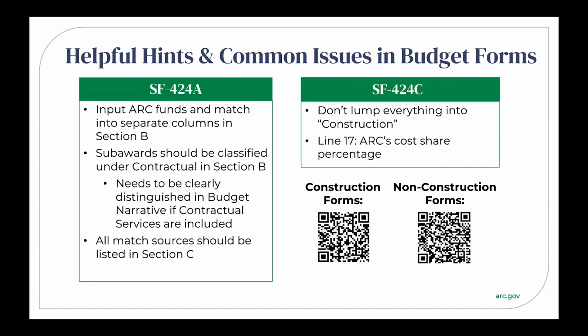For the SF424C, don't lump everything into construction. Separate the amount into line items if applicable. Grantees often experience difficulty with line 17. To get at the right total amount requested of ARC, you may have to work a bit with the percentage in line 17. Don't get frustrated.